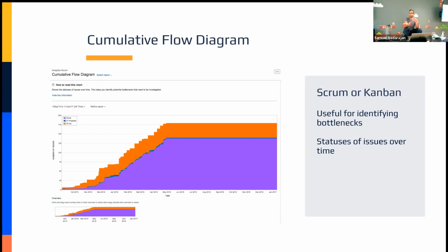and if you start to see that staleness indicator, as I call it, it's actually called the days in column indicator, the more that grows, the longer that tells you this ticket hasn't seen any movement, right? But anytime you see work stack up in a particular column, which is mapped to a status, that lets you know that there's a bottleneck.